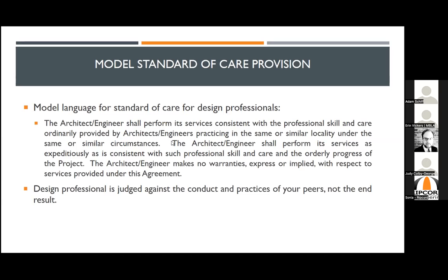that an ordinary competent architect and engineer would provide, practicing in the same or similar locality under the same or similar circumstances. So in essence, what the standard of care does is that you as a design professional are being judged against the conduct and practices of your peers and not necessarily the end result. And that's where you want to be at.